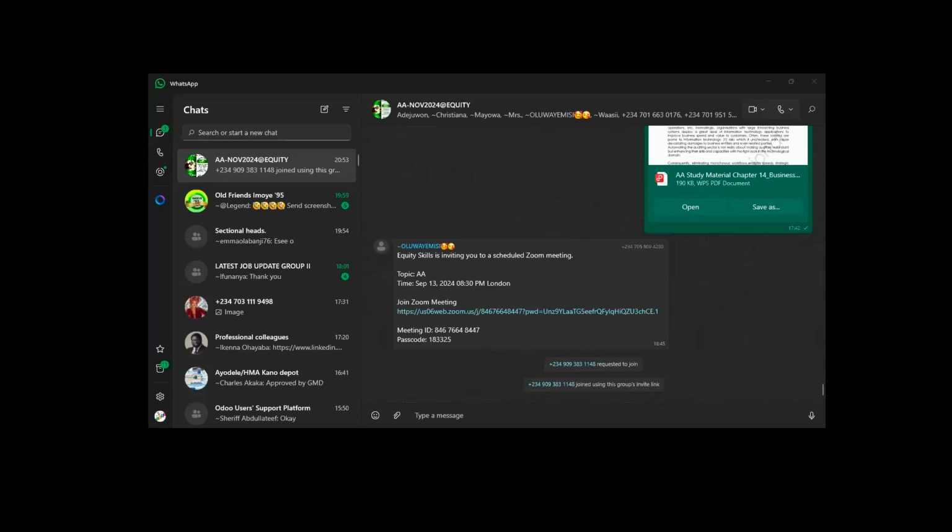The auditor will sample some of those purchase invoices for raw materials and subcontract costs, including the cost of labor. Labor is part of the cost of the building. Those people paid to come and work as foremen, those building contractors, their pay, everything will be added to the cost of that building.